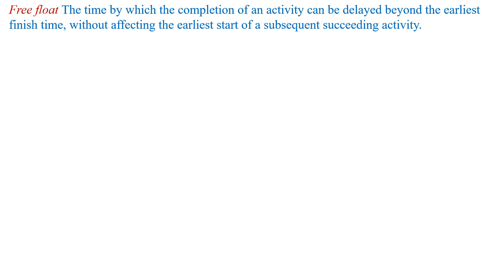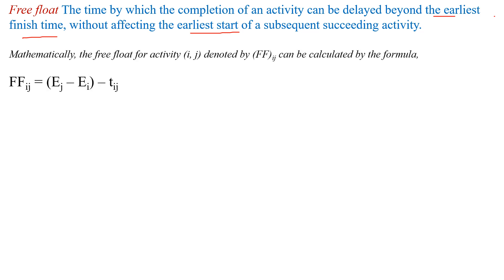Free float is the time by which the completion of an activity can be delayed behind the earliest finish time without affecting the earliest start time of the succeeding activity. Mathematically, free float equals Ej minus Ei minus Tij.